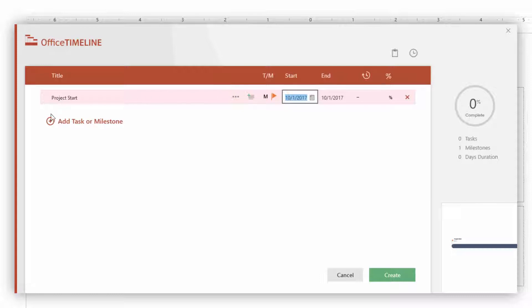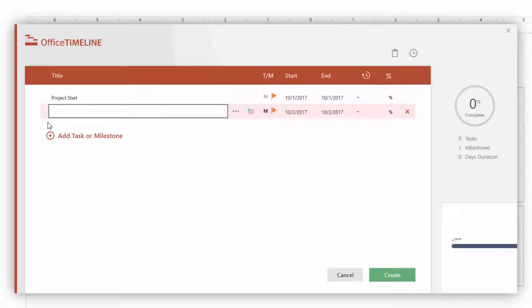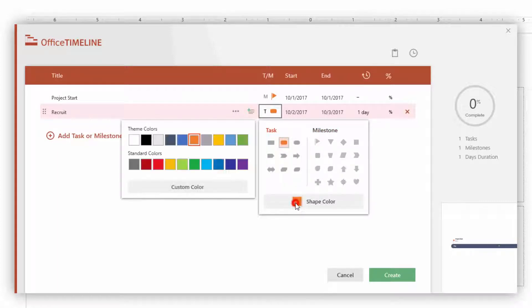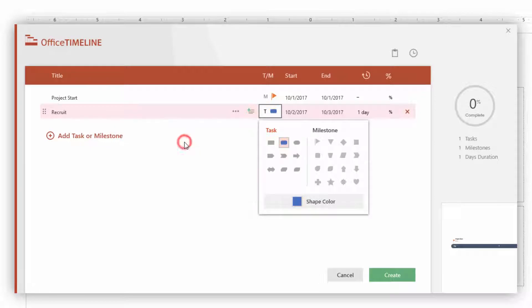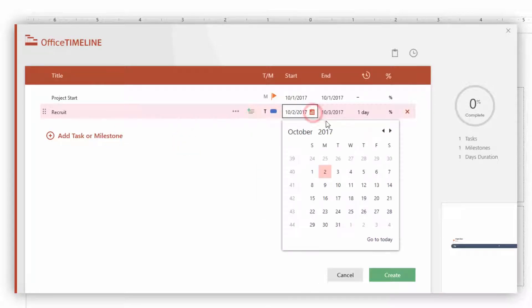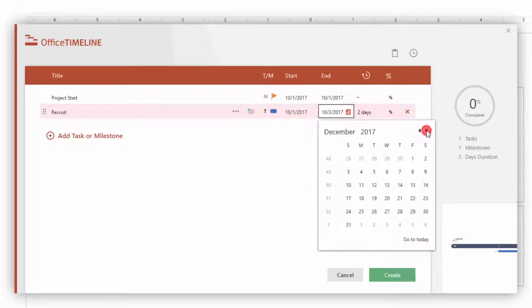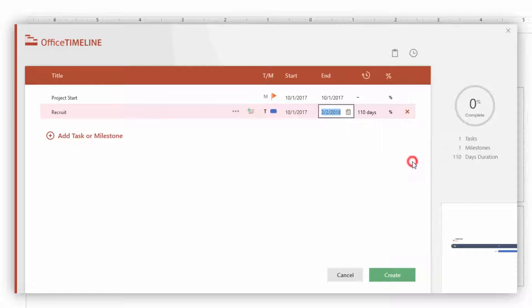To add my next task, I'm going to click Add Task or Milestone below. This is going to be Recruit, and it will start as a milestone by default since it always starts as your previous selection. This is actually a task, so I'll choose the rounded task shape and change the shape color to blue. I'll open up the calendar and select October 1st for the start date, then click forward to select the March 2nd end date, which automatically calculates the 110-day duration for your task. You can also input a percent complete here if you want to.